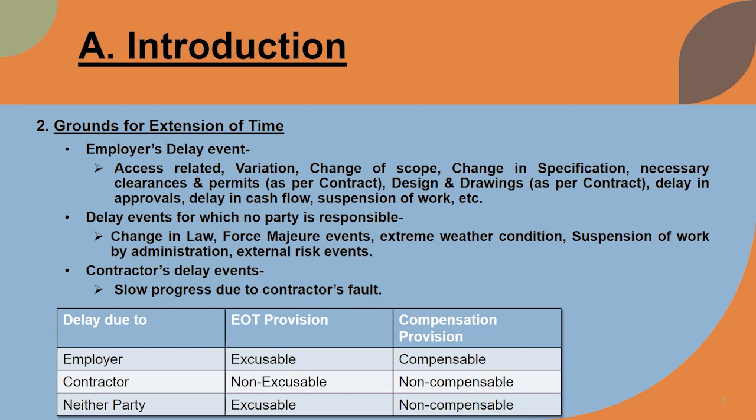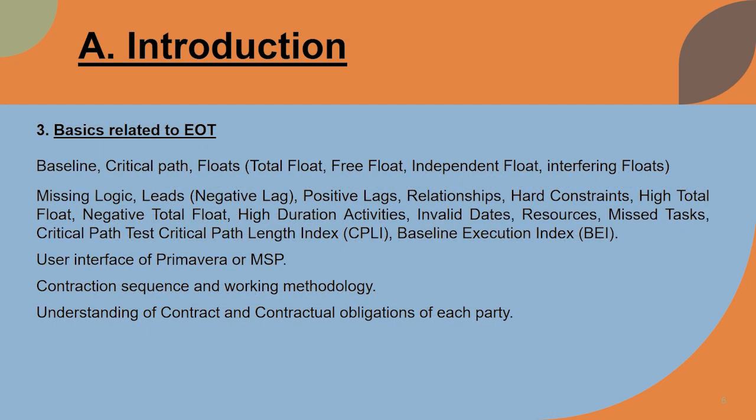However, in the case when the delay is from neither party, which is already mentioned above, extension of time can be granted, but no compensation can be awarded for this kind of condition. I have listed some basic requirements which everybody should know before preparing an extension of time proposal.